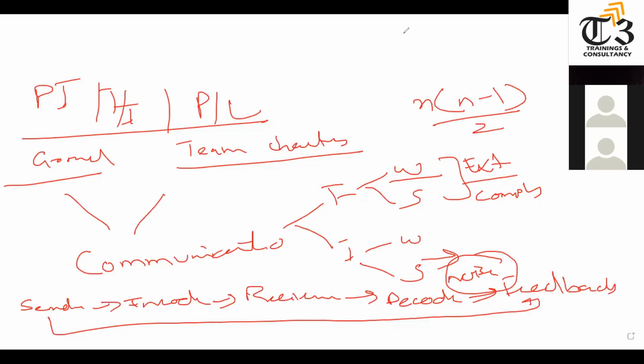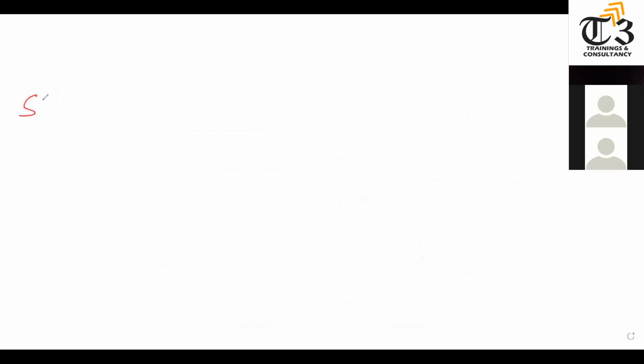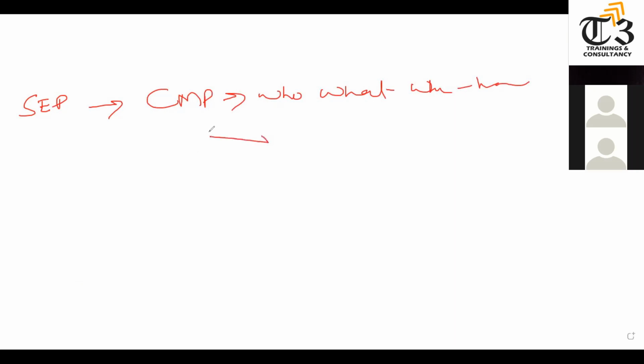Based on the stakeholder management or engagement plan, you will find out how to engage which type of resources, like what the escalation is. Based on that, the communication management plan will be produced, which says who needs what information, when, and how, which technology, and with which frequency. So the communication management plan will define that you have to send the sponsor this information, executives this information, the team this information, management this information, and so on.